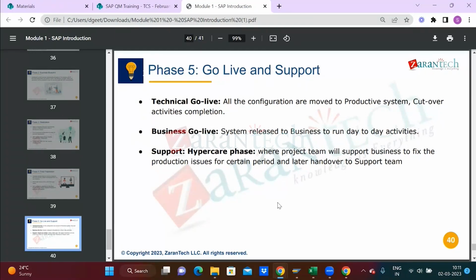Agile is not like starting by getting the complete requirements. If we are going with agile, you will collect like 50-60% of requirements and start with the project or development. During the development phase, the additional requirements will come in, because we are not waiting for 100% of requirements to be collected. So at least 70% requirement is there, let's start the development, let's start building a form first. During the development phase, in parallel, the discussions will happen, and the requirements coming in we are adding to the development.